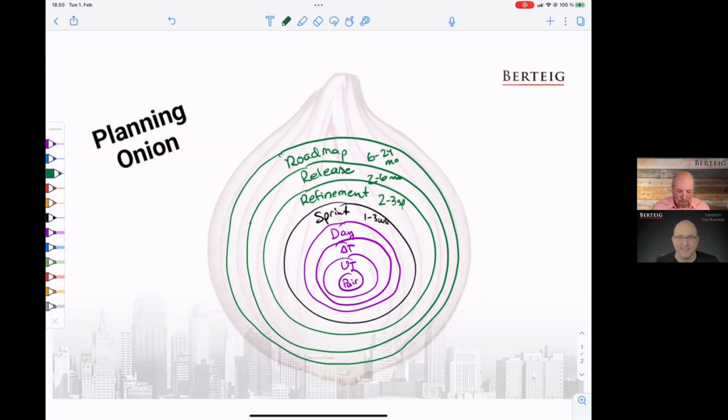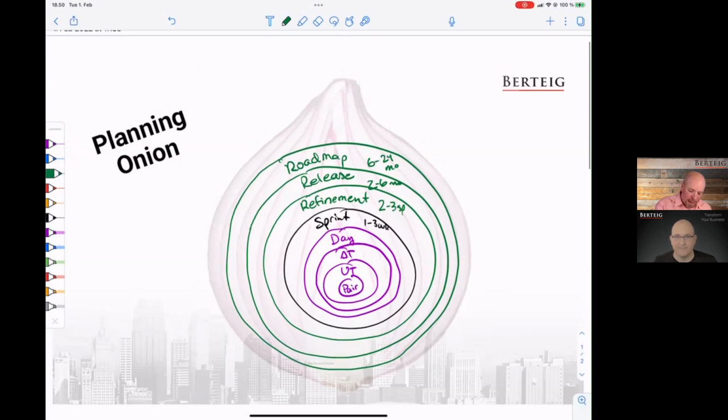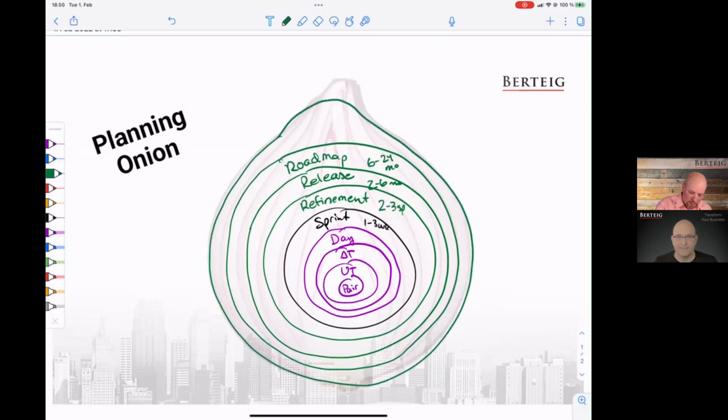Anyway, so roadmap, that's sort of what kind of future releases are we planning to do, and numbering, and what the main content epics that we intend to deliver in each of those. Now, the last layer, the outermost shell of this planning onion, is then, of course, the vision, the product vision that we have for this.